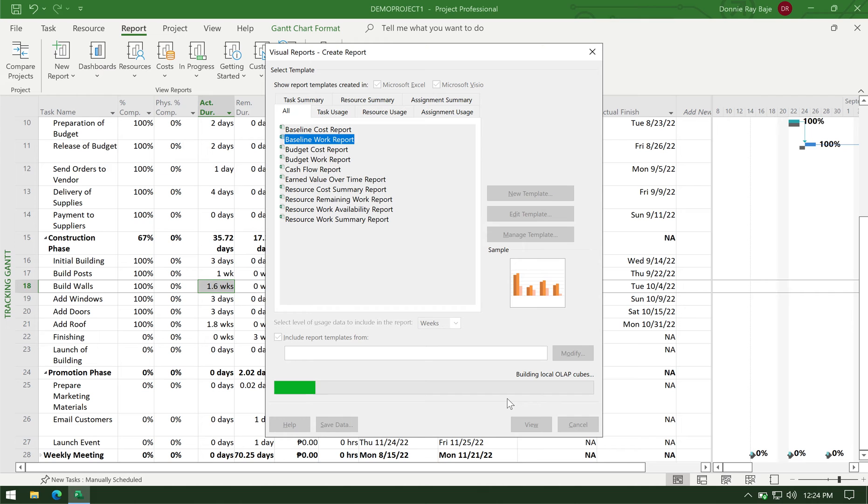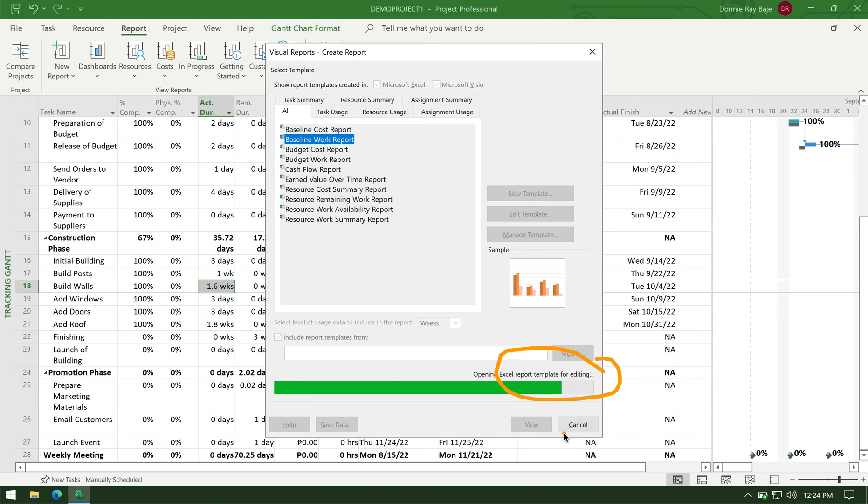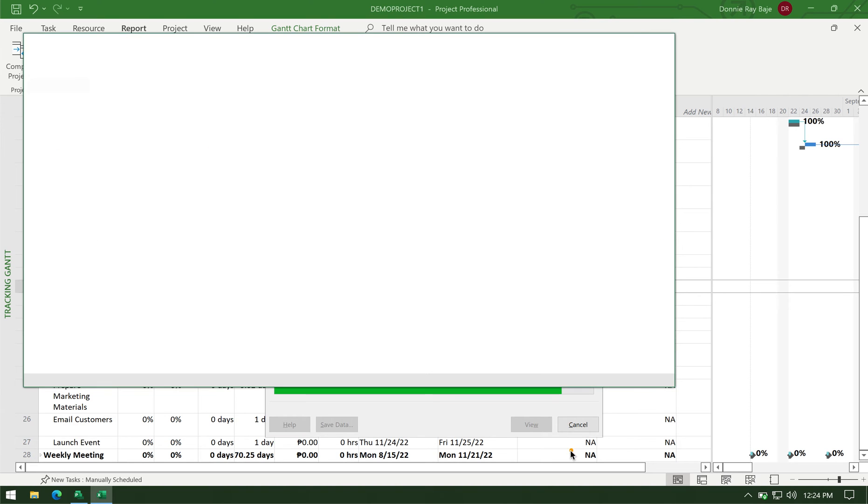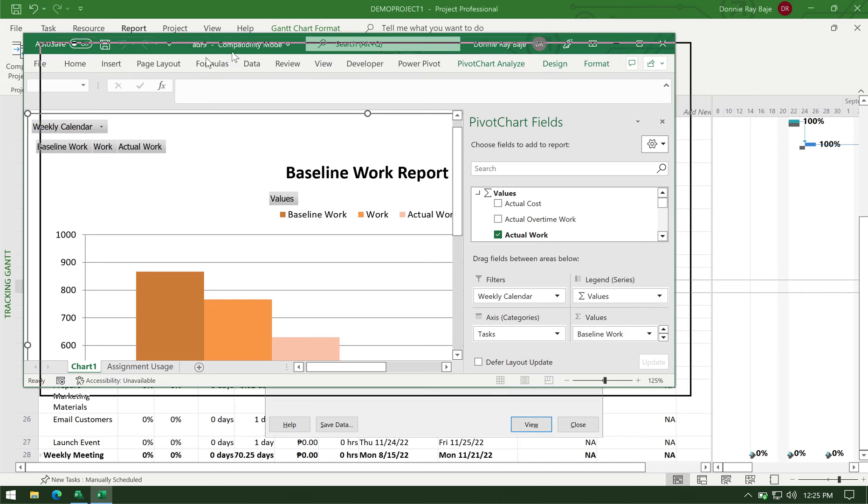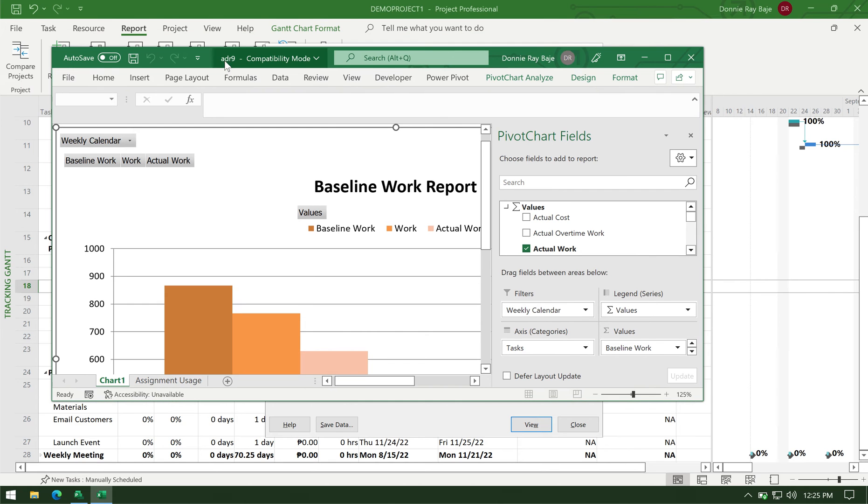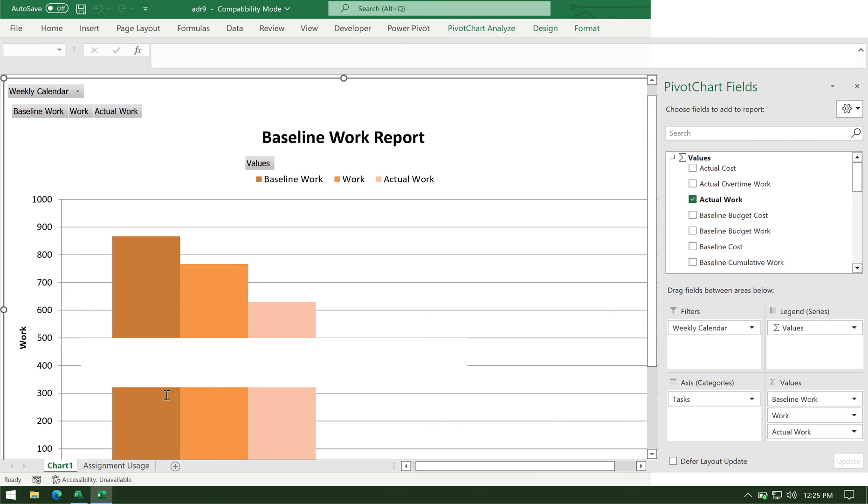And MS Project will start loading in the report in a form of a cube. So it's technically a data source that it creates behind the scenes. And let's just wait for Excel to load. By the way, MS Project doesn't create S-curves. You have to download the data to Excel because it's Excel that will create the S-curve for us. So as you can see here, I have Excel open.